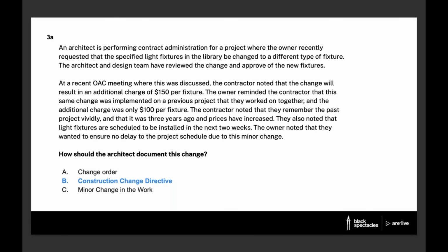Yeah, that's a good question. I think in reality, the contractor could be the one that puts pen to paper and fills it out, but ultimately the architect is the one responsible for it according to the AIA documents. The owner also is a key party in agreeing to the amount of the change order, whether it's a monetary amount or a number of days delay or something. So it's not something that just the architect and contractor can do without the owner's involvement. A really key part of a change order is that there's agreement amongst the three main players in the project: architect, owner, contractor.